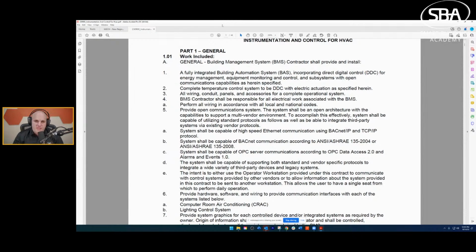To give you a better example, if you've ever been involved in building your own home, if it's not a spec home, you start off working with an architect and create your vision. Then you get the schematic design, which is the general layout, the orientation of your house, etc. Then you move on to design development, where you start to lay out floor plans. And then construction design gets into the specific details of the actual layout, like where the HVAC ducting goes, where the lighting goes, where all this stuff goes so that it can be released to construction and built.